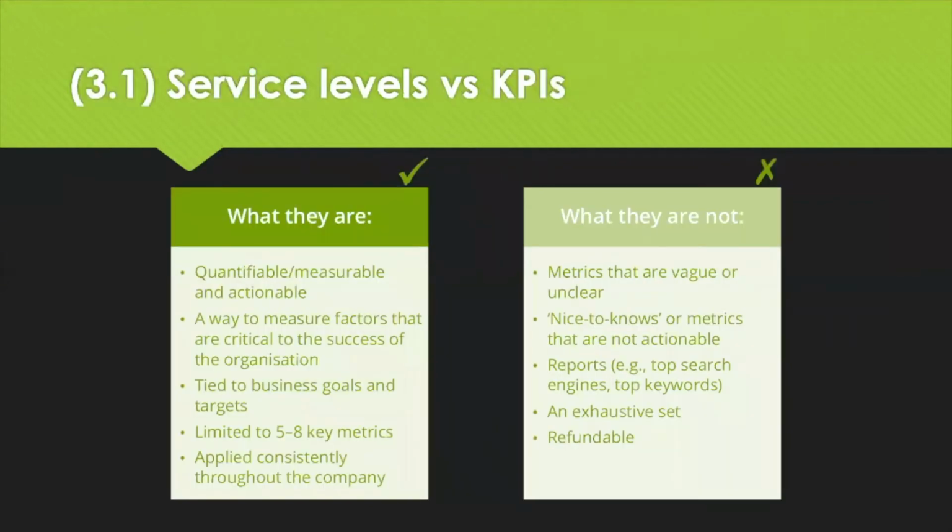Service levels are used to indicate the level of performance and delivery expectation during the term of the contract, like a cleaning or an ICT support contract. The service levels should be SMART to avoid ambiguity, so that's specific, measurable, achievable, relevant, and time-bound. And the supplier's actual performance or delivery of the service is compared against what was contracted. If the performance fails to deliver the agreed level, service levels are used to ensure that suppliers fix any causes of the reduced performance. And service credits will be issued. The deduction of an amount from the service charge is based on the extent to which performance failed to meet the levels set.